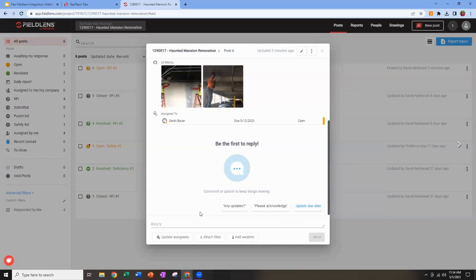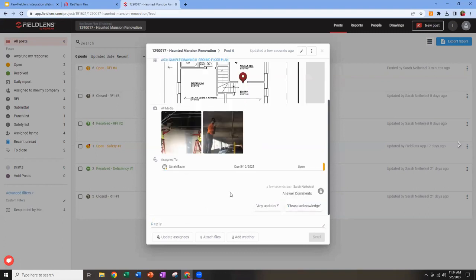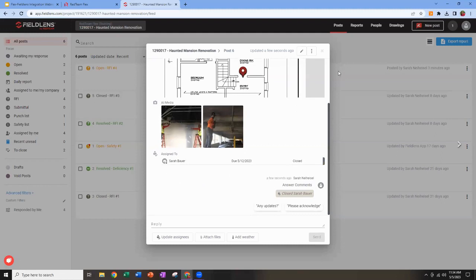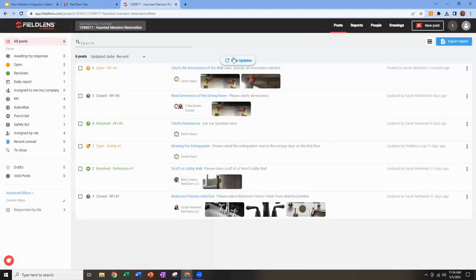I'm going to go ahead and mark this individual closed. So we'll go ahead and say answer comments here. Right, Sarah can put all of those in. She can add photos, anything she needs, files to clarify, and then she can say, hey, I'm done. I'm resolved. Right, she marks herself resolved. The closed piece is generally an employee on your team who will come in and verify that you have everything you need and mark it closed. Now, once she's marked closed, there's nobody else on this post.